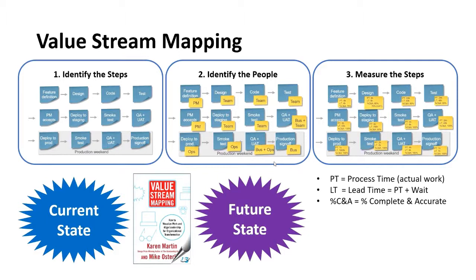But rarely do we have that type of situation, not only on individual steps, but throughout the entire system. So lead time equals process time plus wait. And of course, wait is a type of waste in lean. Regardless if you're doing software development, manufacturing something, or delivering a service, think of all the wait states that occur at each step in your value stream. So in this particular case, we have a feature definition that has 100% efficiency in comparison of the process time and lead time, 4 hours and 4 hours. But if you go to the next one, it's much different. Process time was only 4 hours, lead time was 8. So there was 4 hours of wait in that second step on the design step there.